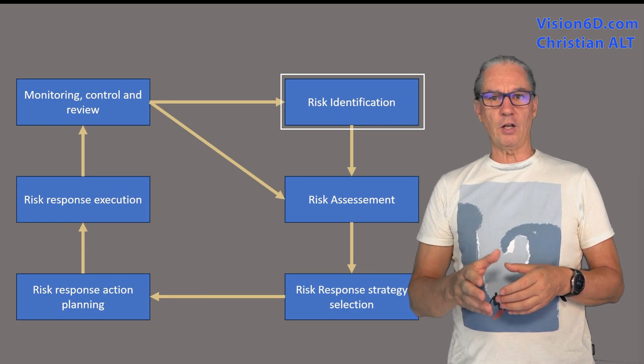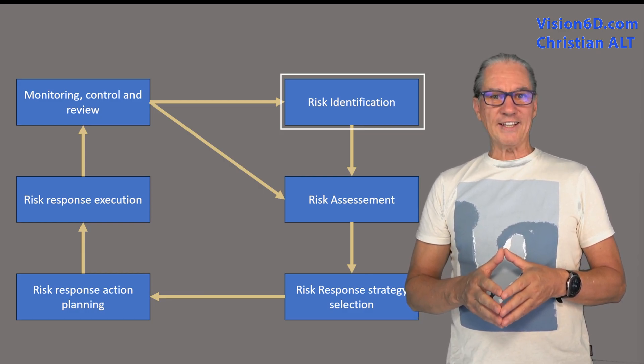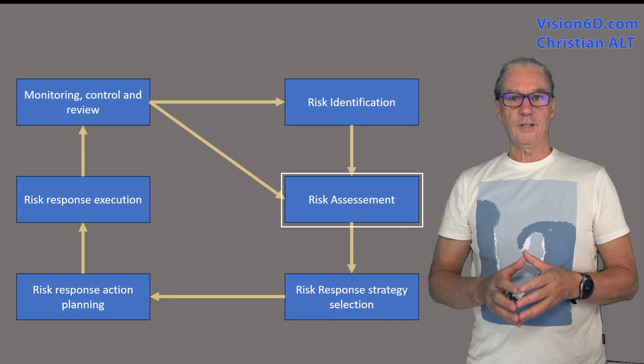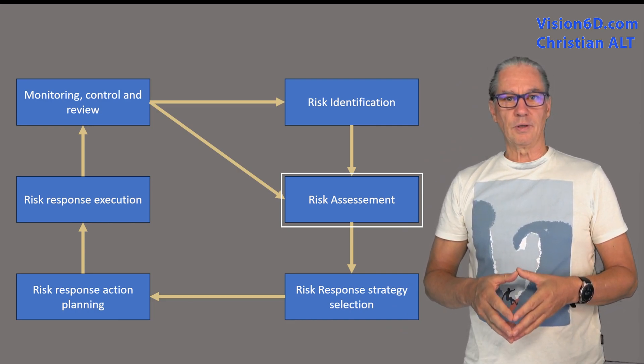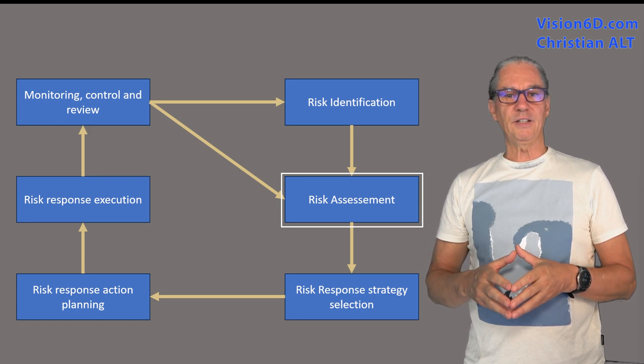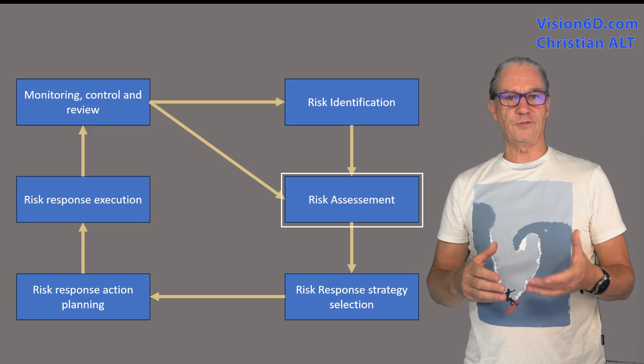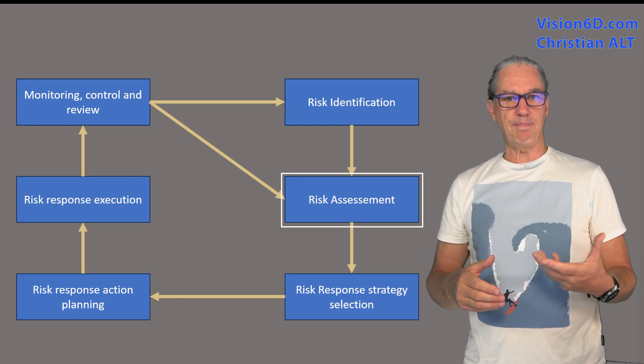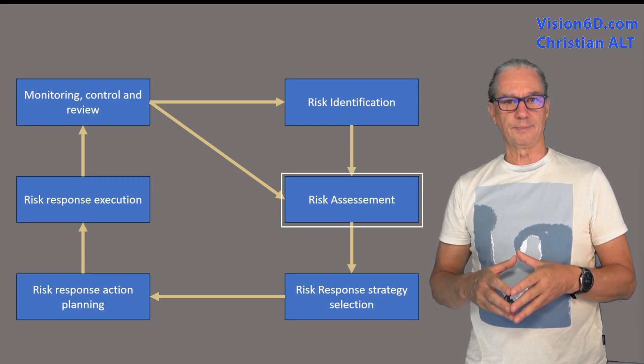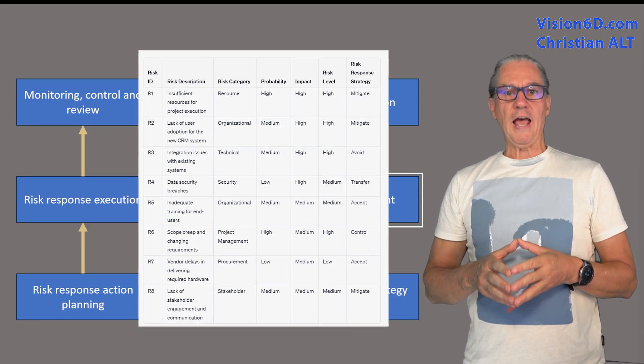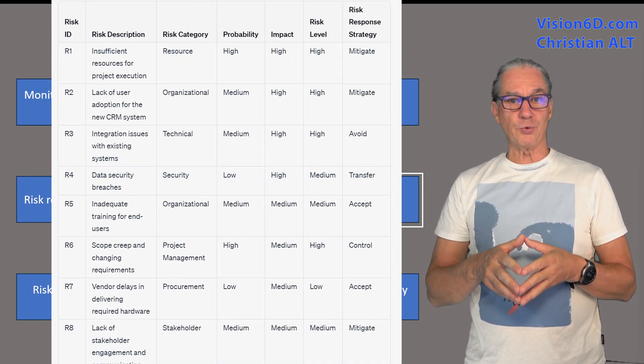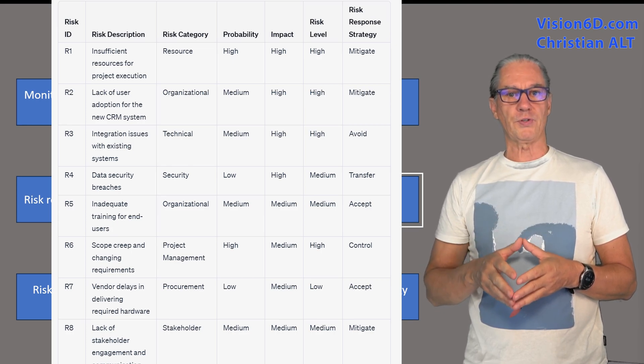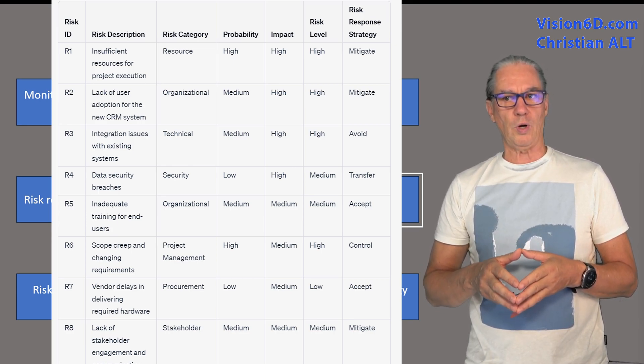The second step is the risk assessment. We will look at the probability of occurrence of this risk on the project and its impact on the project. This assessment helps us to prioritize the risk we are going to treat and to be focused on the most important ones.